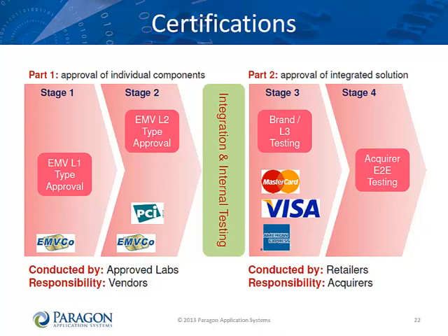This must be done prior to formal certifications because what you certify is what you must put into production. You will want to do pre-certification testing before you attempt formal certification with others. This will give you a better chance of passing the formal certification on your first try. Because these certifications are expensive and time-consuming, you do not want to do each one more than once.